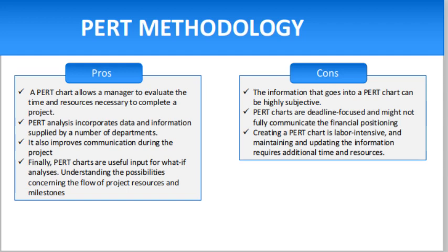Regarding the disadvantages: the information that goes into a PERT chart can be highly subjective and may include unreliable data or unreasonable estimates for cost or time. PERT charts are deadline-focused and might not fully communicate the financial positioning of a project. Creating a PERT chart is labor intensive, and maintaining and updating the information requires additional time and resources. Continual review of the information and the project's prospective positioning is required for a PERT chart to be of value.